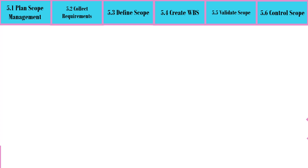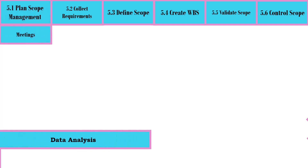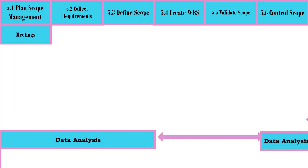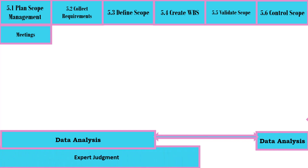Tools and Techniques of Project Scope Management: Plan Scope Management has the following tools and techniques: Meetings; Data Analysis, which is shared with all processes except Create WBS and Validate Scope; and Expert Judgment, which is shared with all processes except Validate Scope and Control Scope. Data Analysis will be discussed in the next slide.